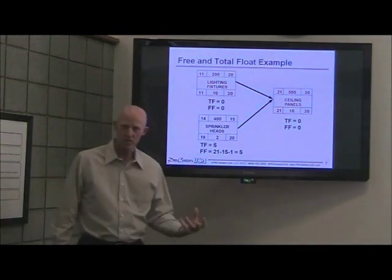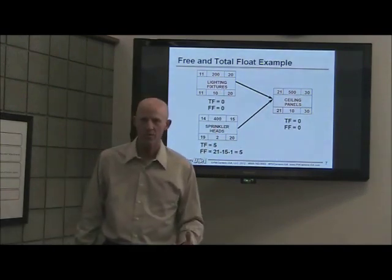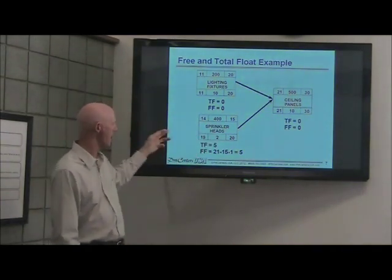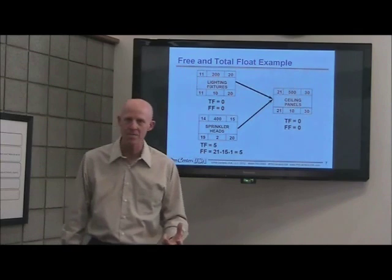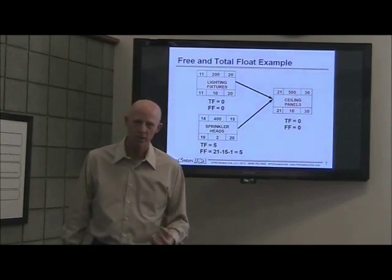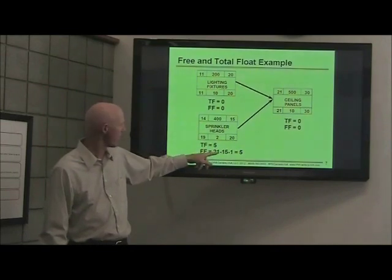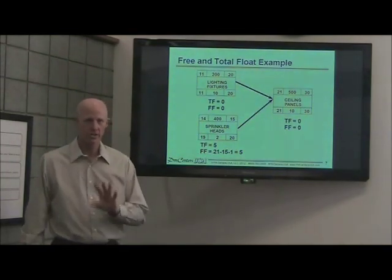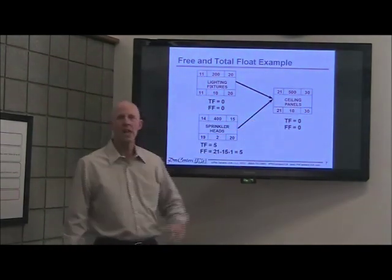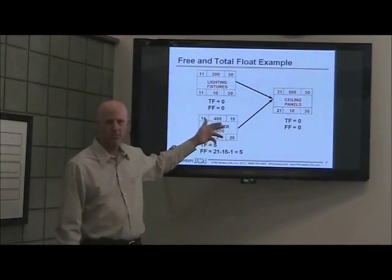What does this tell you? The path with zero float is the critical path. The sprinkler heads path has total float, so it has extra time and can be delayed up to five days without impacting the project completion date. In addition, that one task has five days of free float. Usually in a schedule, when you have two or more tasks converging into one, that's the place to find free float — it may not always happen, but it's a good place to look.